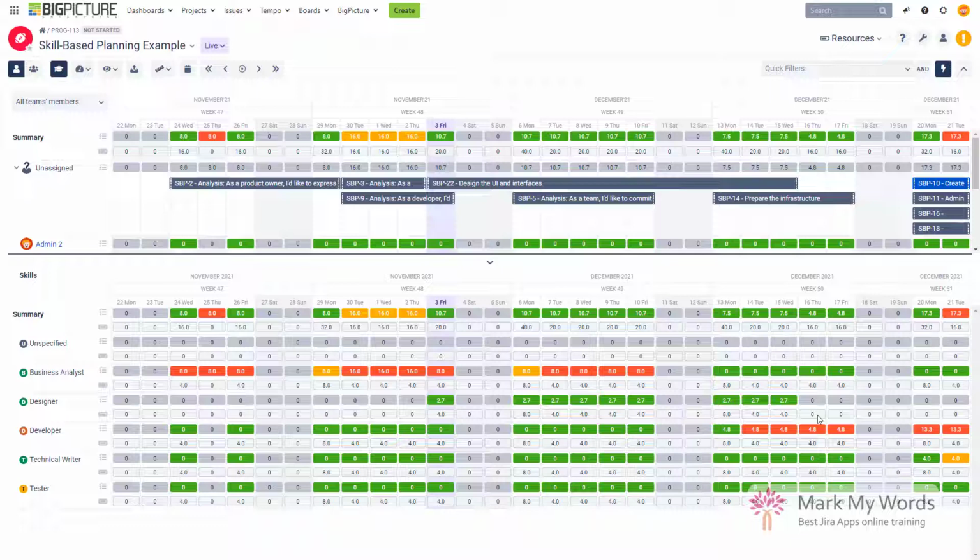Of course, you might want to adjust for some unforeseen things like delays in the project. So maybe we would want to have them here just in case for the 1 or 2 additional days, right? But that's of course up to the project manager to decide how much of the contingency we want to keep. And this, of course, we would have to do with all the other roles if we would like to have a perfect match, right, from one side to the other of our role necessity versus our role availability.